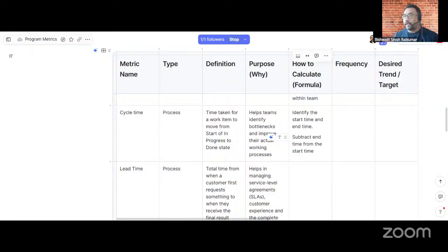And I think this cannot be used at the individual level. It has to be at team level, yes. Team level, and some homogeneity should be there, because we cannot put different kinds of things together and calculate cycle time. Some repeated kind of operational work. It could be something like finding the average of the works. Yes, we have homogeneous work, and within that also some average of it.